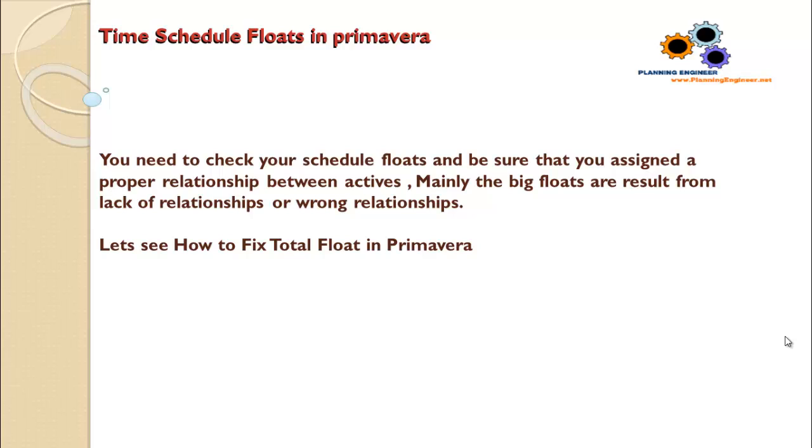This is the first thing the consultant or the client or whoever will review a time schedule will look for - they will look for the total float. This is the first thing they will look to. Okay, let's go and see in Primavera how to find and fix the total floats.